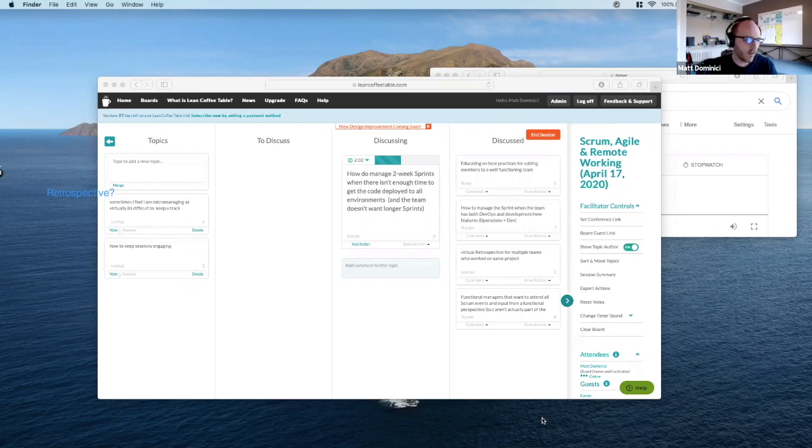Because when you have a lot of manual testing that's required, it always snowballs like that. And so you're always going to feel like, well, if we just had a longer sprint, then QA could catch up, or maybe we just need to hire more QA people and fewer development people and that sort of thing. And the hard truth usually is we need to take a hard look at our definition of done.